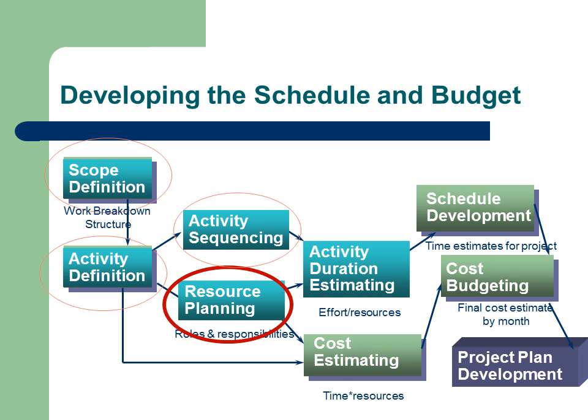In other words, assigning 2 people to an activity with a work effort of 10 days will not necessarily reduce the duration to 5 days. This is because there are often overheads associated with 2 people working together. However, in order to complete a project as quickly as possible, it is good practice to assign as many resources as is practical to larger activities.